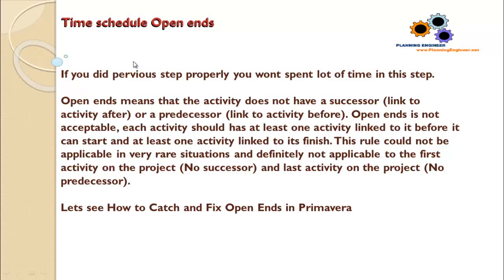Time schedule open ends. If you did the previous step, which is linking the activities and adjusting the total float, probably you won't spend a lot of time in this step. Open ends mean that the activity does not have a successor linked to the activity after, or a predecessor linked to the activity before. Open ends are not acceptable.